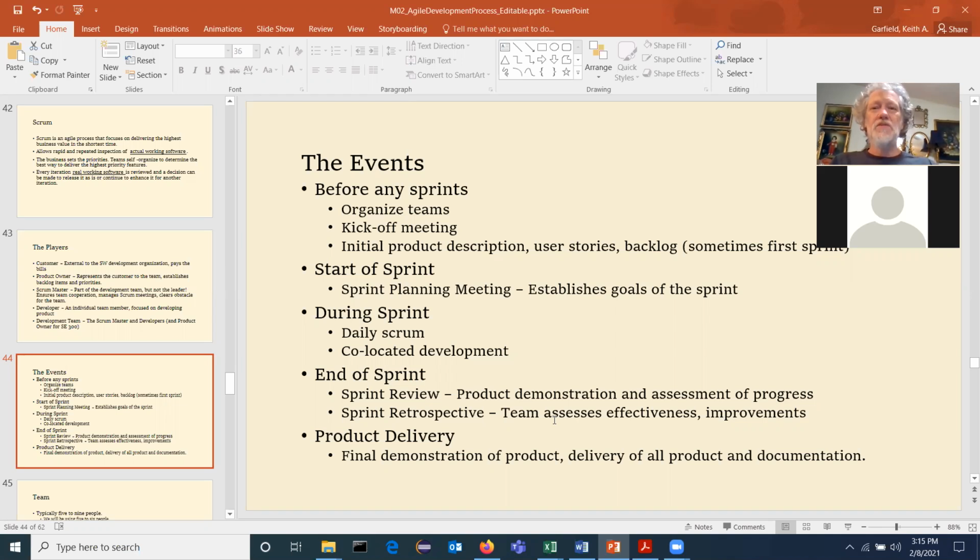But let's pretend you guys get to meet 5 times a week. You say, oh my God, that's a lot of meetings. It's going to take up all my time. No, the whole point of the Scrum is it's designed to be a rapid fire, quick meeting. In fact, we do this thing called time boxing. We've allocated 15 minutes for this meeting. And at 15 minutes, we are done.